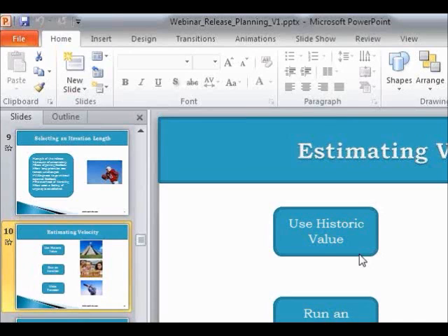So if the stakeholders or product owners are playing with the release scope very frequently, your release burn down chart will reflect the reality iteration by iteration. That is the reason I recommended that we should have at least 5 iterations in a release. So at the end of an iteration, you would be clear about where you are heading, and that will be your management tool to control the scope.